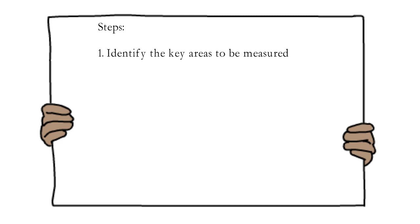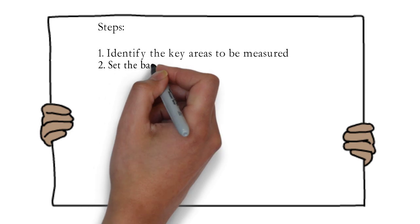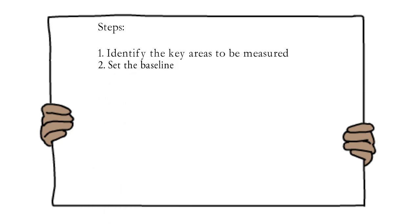The second step is to set the baseline. The key area to be measured here is the test execution productivity of resources working in the project. We can set the baseline as five test cases per resource per day, meaning every resource should complete five test case executions daily. If every team member follows this, the project goal can be met on time.